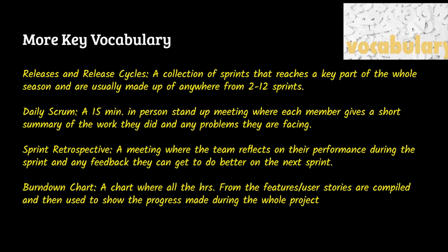So more vocabulary, there are releases and release cycles. It's basically a larger term encompassing sprints, and once you've done a release, you reach a key part of the whole season because these release cycles are made up from anywhere from like 2 to 12 sprints. So they're a good chunk of whatever you want to get done throughout the season.